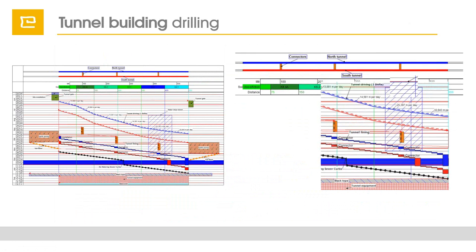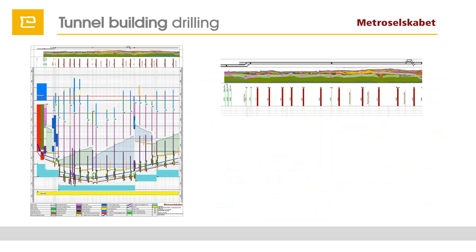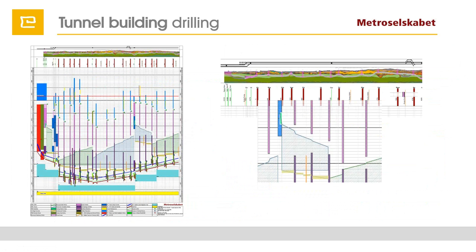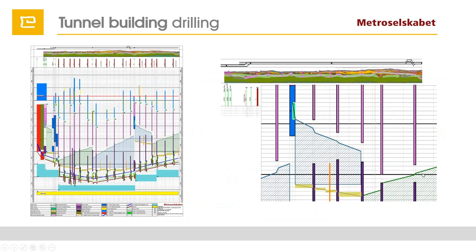This is the metro of Copenhagen that was also built with TILOS. Here the usage of TILOS was mainly to optimize the usage of the tunnel drilling machines. These were planned first, and then backwards from the tunnel drilling machine, the milestones for building the stations were calculated.